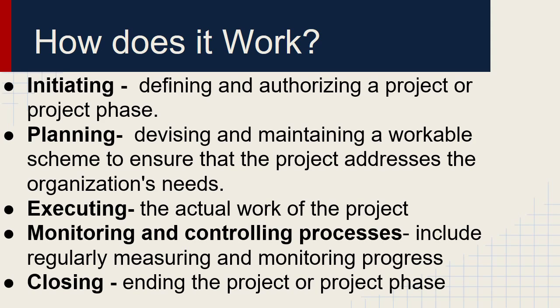Closing processes include formalizing acceptance of the project or project phase and ending it efficiently. This often includes administrative activities such as archiving project files, closing out contract documents, documenting lessons learned, and receiving formal acceptance of the delivered work as part of the phase or project.